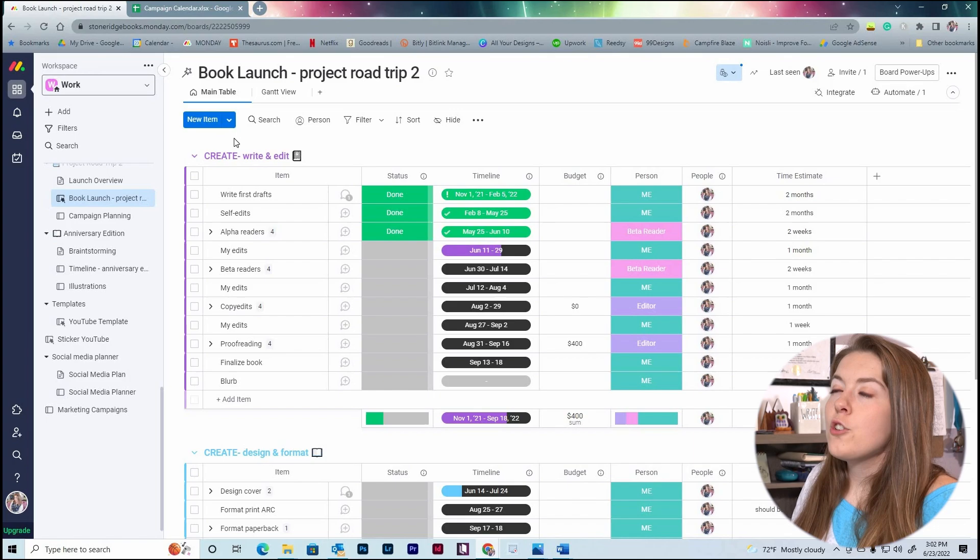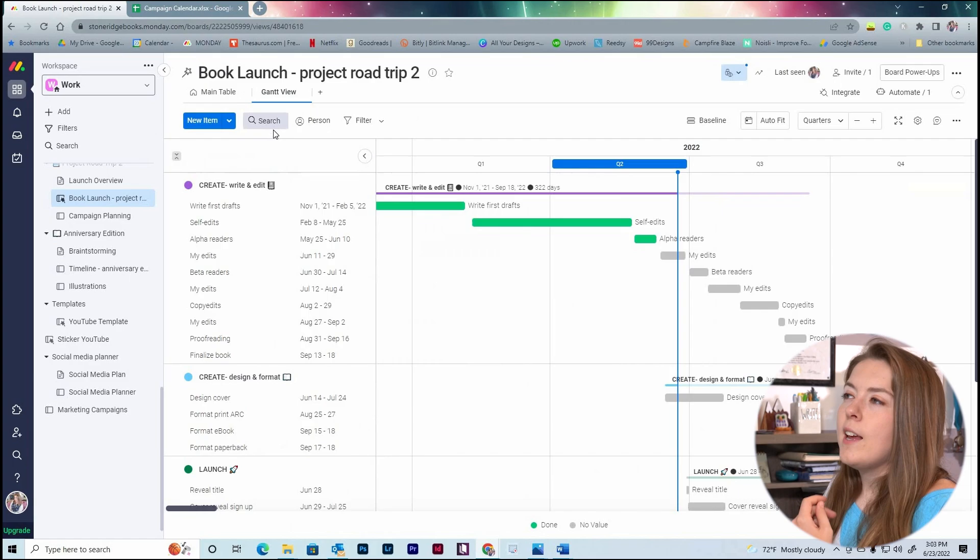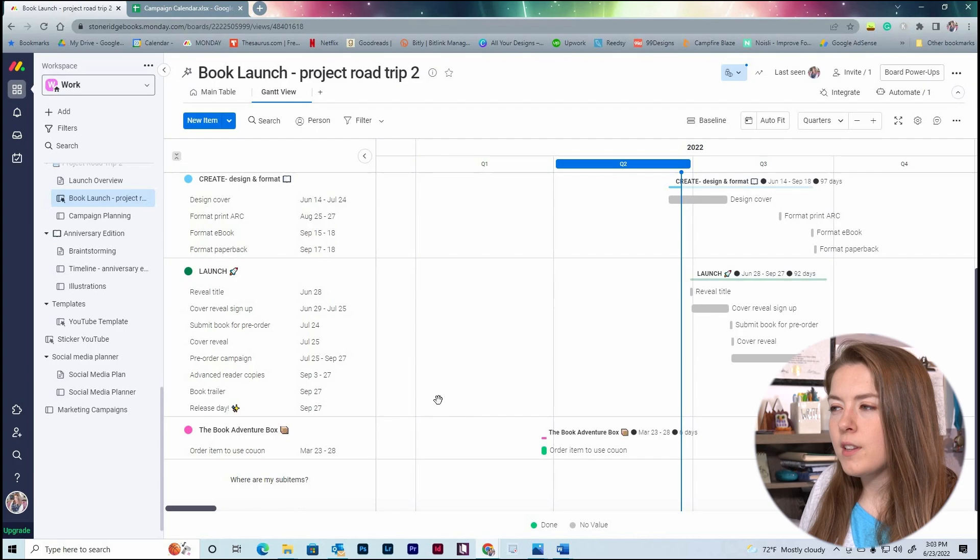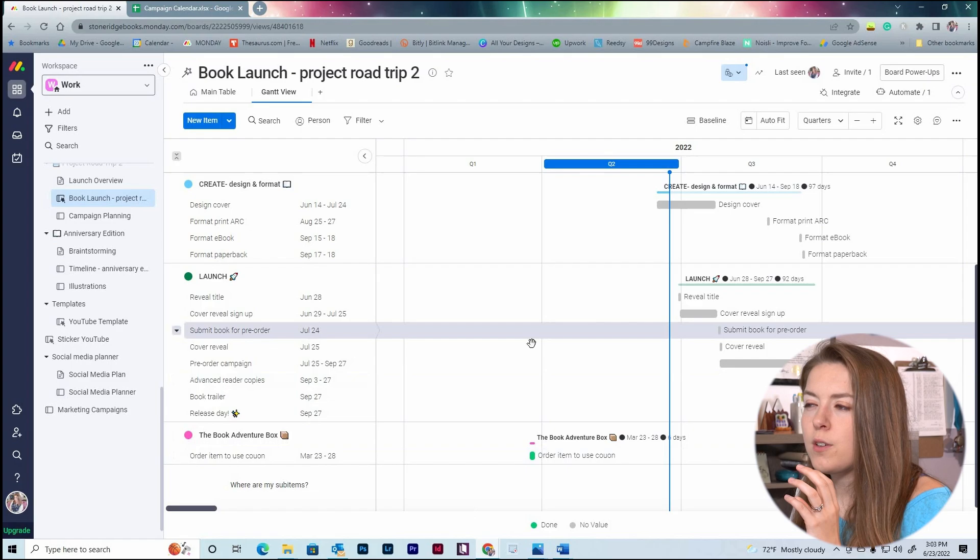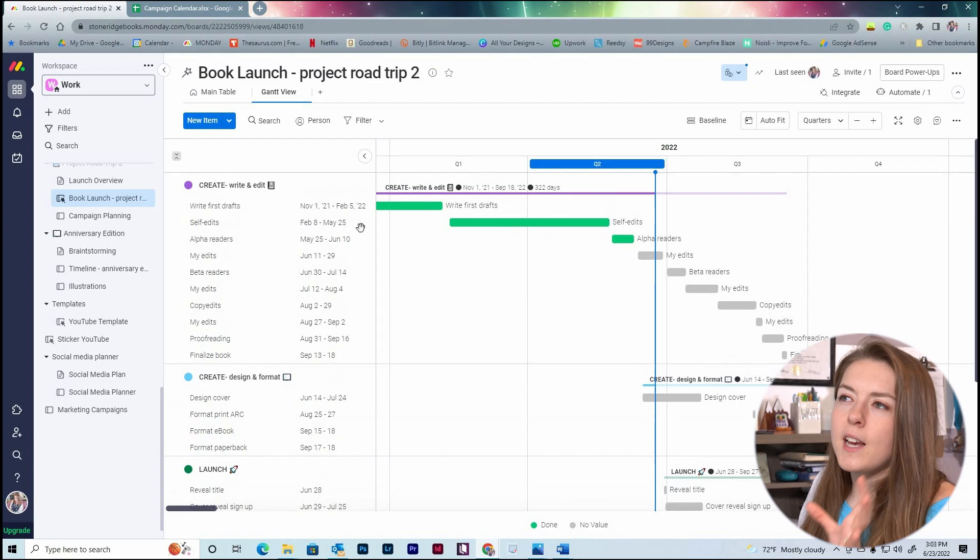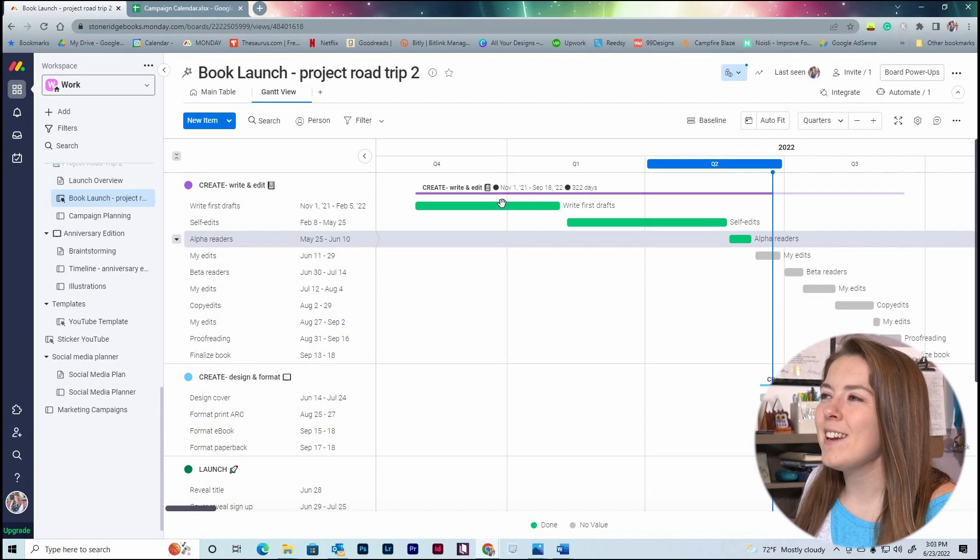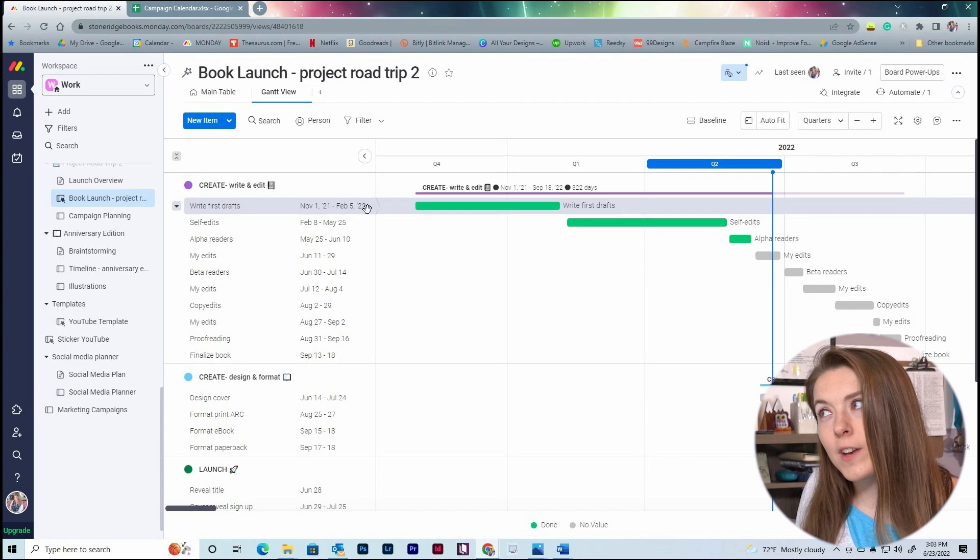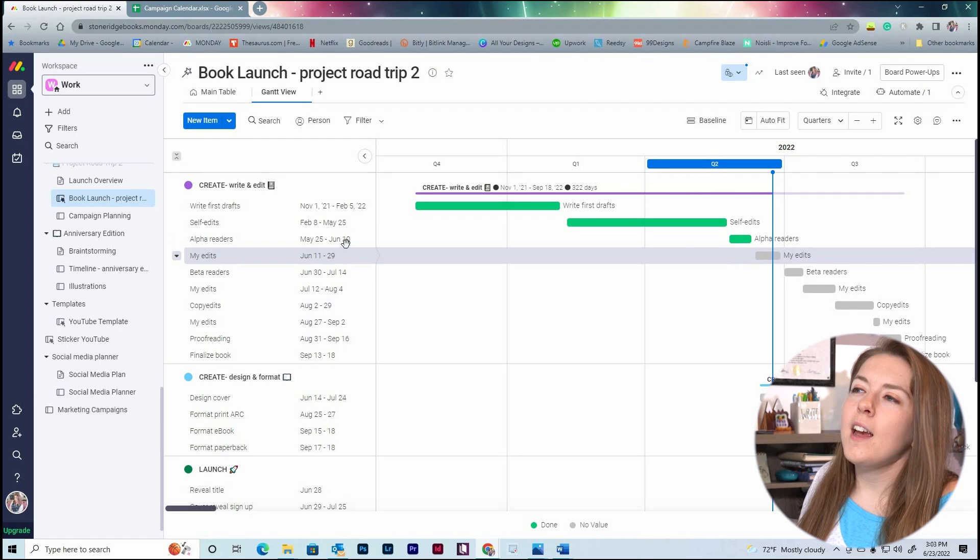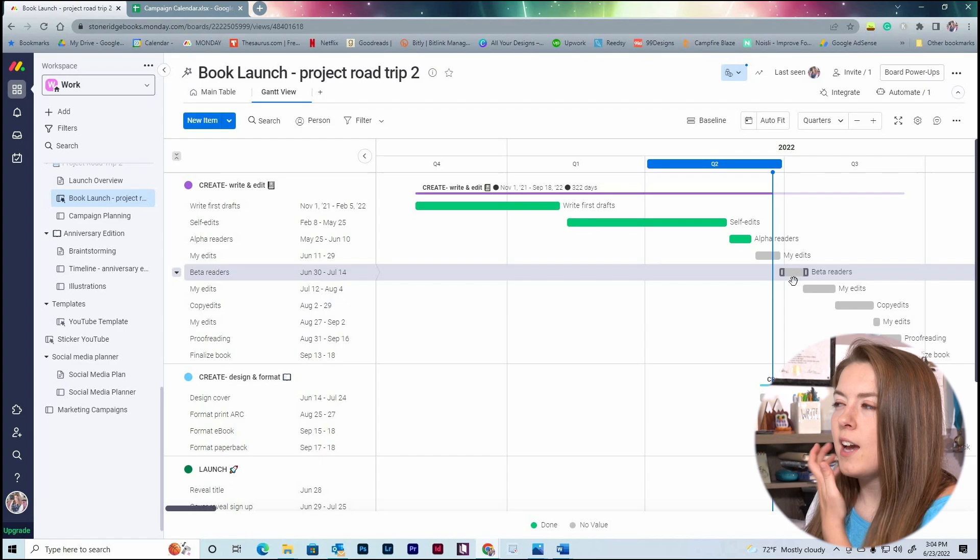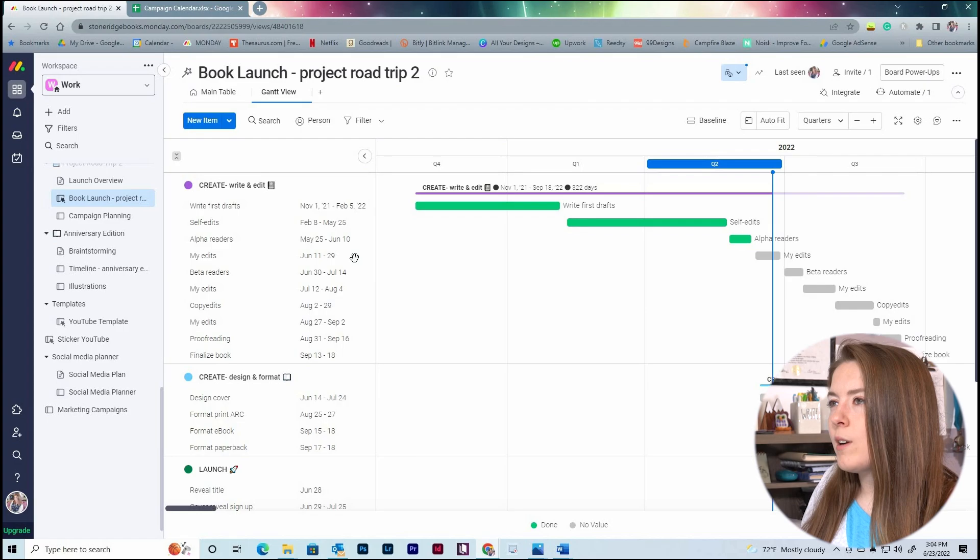Once you plug everything into the main table, you can then create a Gantt view and that creates the Gantt chart which we see right here. So you can see again we have our little sections: the write and edit section, the design and format section, the launch section, and the book adventure box. I'm missing my post-release section from the chart, but that's because I don't have any dates associated with it yet. But once I add the dates onto that section, it will automatically load into here. You can see here that I was writing the first draft of this book from November 1st to February 5th, and then I was doing self-edits from February 8th to May 25th. This green means that the task is done.